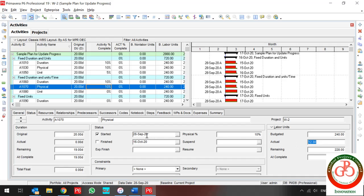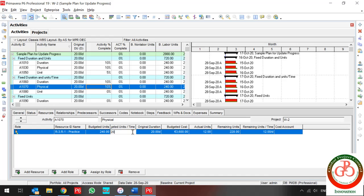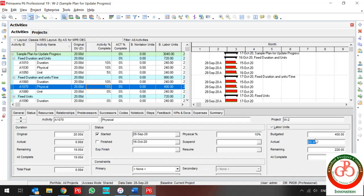Why does actual decrease? Because my unit per time is fixed, and my duration is also fixed. For each day I can only use 12 budgeted labor units per day. So if my remaining duration decreases by one day, the actual labor units are at most 12. If I enter 20, the budgeted labor unit changes because I entered a new estimation for one-day budget labor unit usage.